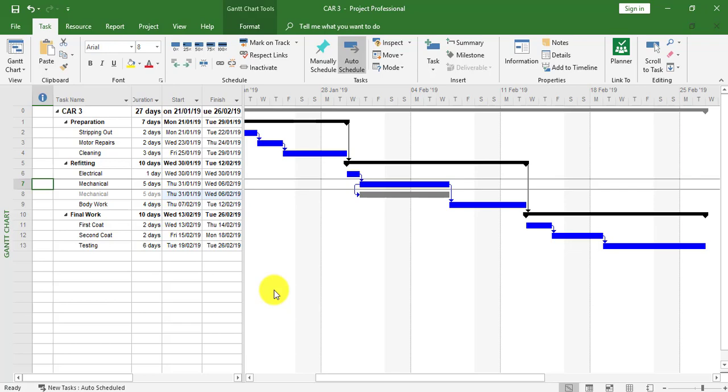This shows how tasks can be linked between two individual projects using external tasks and copying paths from one project to another to link these tasks together. A grayed out task bar and grayed out information in the project means an external task linked from another project.